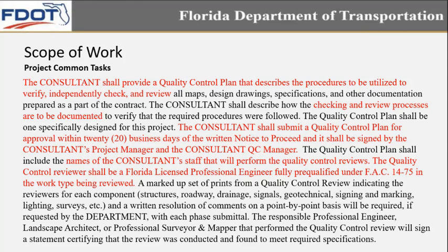and the consultant shall submit the quality control plan for approval within 20 business days of written notice to proceed, and it shall be signed by the consultant's project manager and the consultant's QC manager. That's a role we didn't talk about earlier, but that's a critical role. On every project, there should be a consultant QC manager.